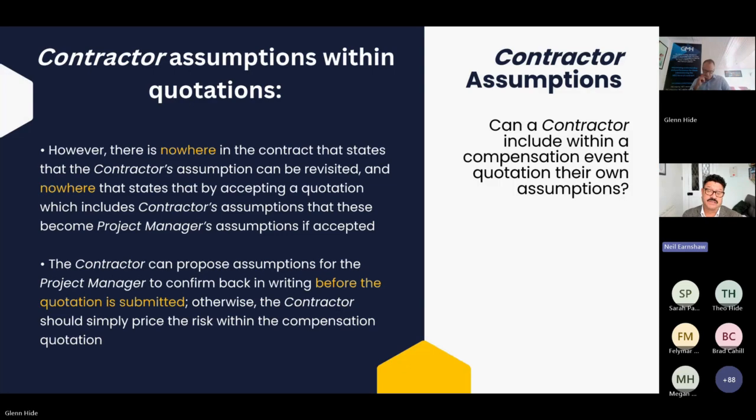Yeah, it's something that, I mean, we've developed a simple mantra, haven't we? There's no such thing as a contractor's assumption. People think it exists, but when you analyze the contract around the assumption clauses, there is absolutely no way for the contractor to make one of their assumptions an assumption that would trigger a compensation event. Really important what you've said about suggesting it to the PM, but the PM actually needs to state it themselves and issue it to the contractor. I've seen a number of clients of mine fall foul of that over the years.